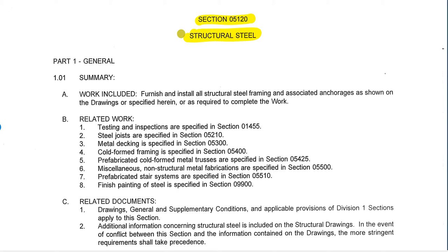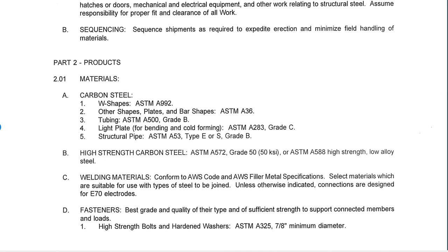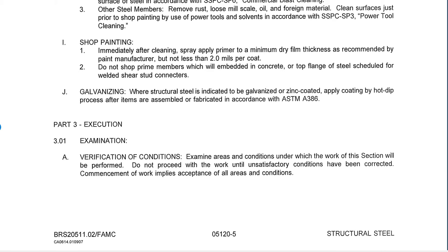Specifications are usually divided into three parts using the standard. Part one covers general conditions specifically for this scope of work. Part two is going to give us the products — the specific information about what is included. And then part three is execution, which gives information on how the work should be done.